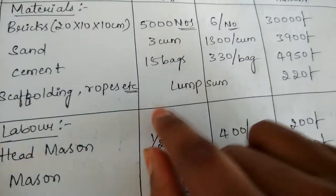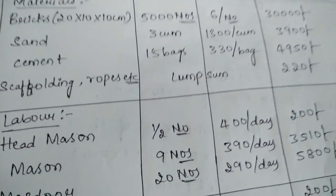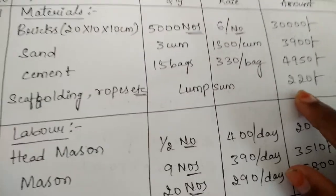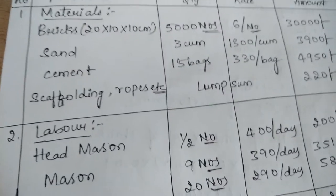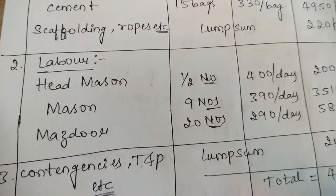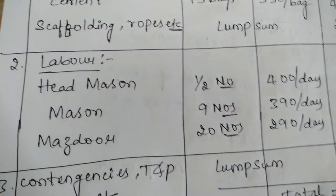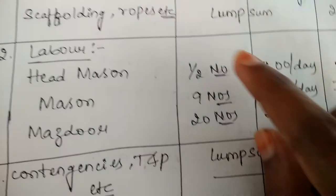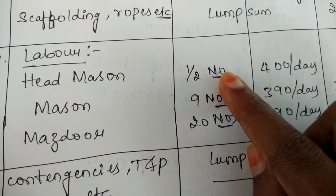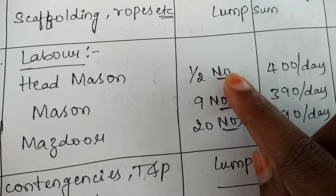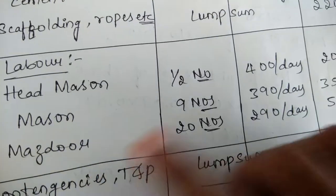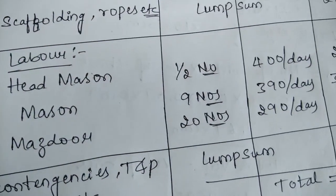For the scaffolding and ropes, we assume a lump sum charge of 220 rupees. That gives you the material amount. Coming to the labor amount, the types of labor required are head mason, mason, and mazdoor. Half number of head mason is required, meaning only half a day, totally 9 numbers of mason will be required, and 20 numbers of mazdoor are required.